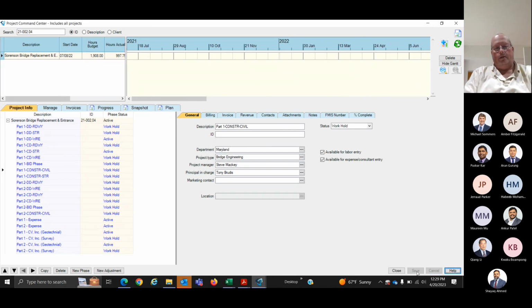When that's done, that particular charge becomes invisible to people. One of the things this will help with, as a PM, is that you don't have to go through your billing reports and say, hey, all these charges are in the wrong spot. They shouldn't be in the wrong spot if it was closed. The thing you have to remember is when you flip to the next stage, you have to go back in and open up those particular charges and close off the previous ones. Questions?